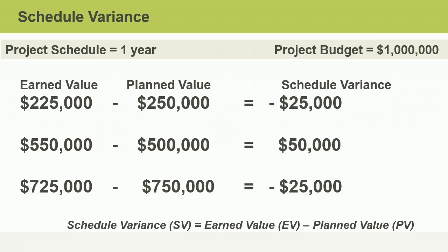What does this mean for your schedule? In this case, you have created $50,000 more in value than you planned to at this point in time. Does this mean you are ahead of schedule, right on schedule, or behind schedule? Pause now if you'd like to think about the answer, and then resume. If you said that you are ahead of schedule, that's right.